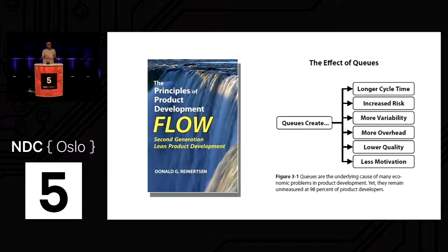It increases costs, and this is again counterintuitive. They increase cost because you get more overhead. So think about governance. I don't know if anyone in the room has got architecture review boards or architecture governance boards, these sorts of things, and they tend to meet every 4 weeks. Requests to do stuff get built up for 4 weeks, waiting for the architecture review board to meet, and the architecture review board have got to review 4 weeks worth of stuff, which takes a long time.